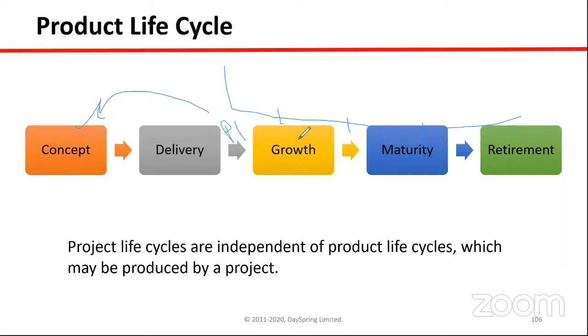Then maybe after some time, we remodel some part of the car, or the model of the engine is improved. So through another project P2, we do the improvement for that car, for the same model, same brand. This way, projects sometimes intersect the product life cycle. So this is the relation between project life cycle and product life cycle. But definition-wise, the two are separate things. Okay.